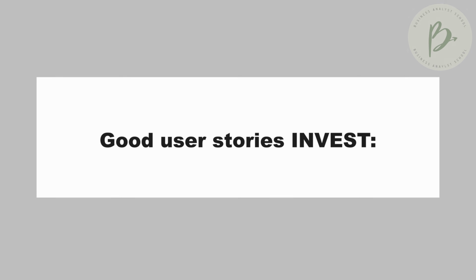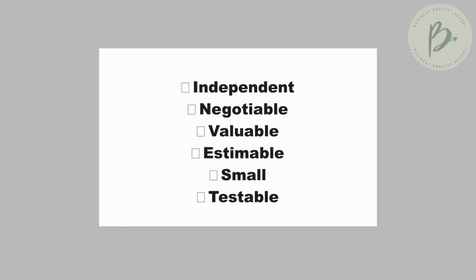So in order to determine a good user story, remember the acronym INVEST. Good user stories are independent, negotiable, valuable, estimable, small, and testable. So a good user story will have all these qualities.